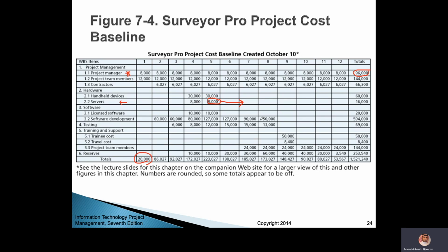Remember the cash flow analysis that I talked about in the beginning. You need to know how much you are going to pay. This is the out cash flow. This is what you're going to pay. So you need to ensure that there's an in cash coming in January that's equivalent to this. Otherwise, you'll have a problem. You cannot pay the salaries. Here, for example, you need to have $223,027 in cash, so that you can pay all of these.